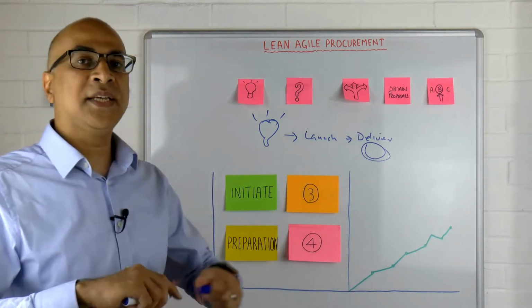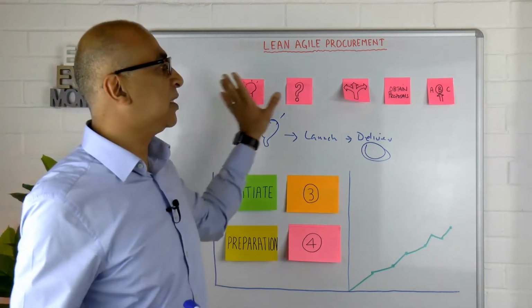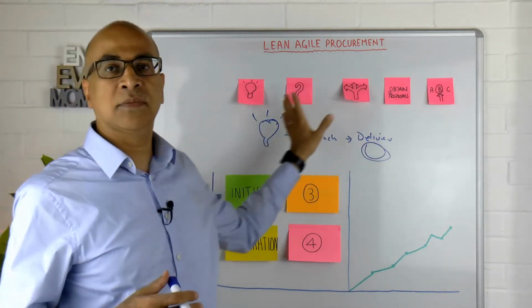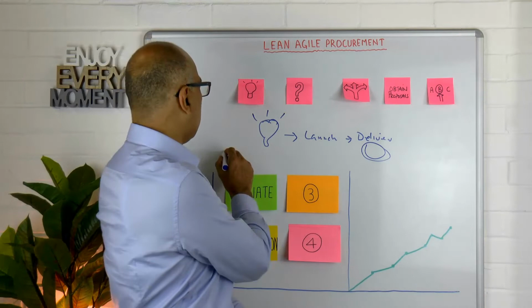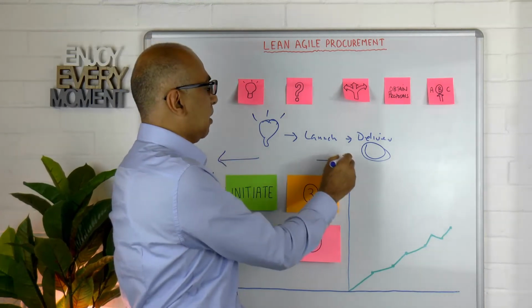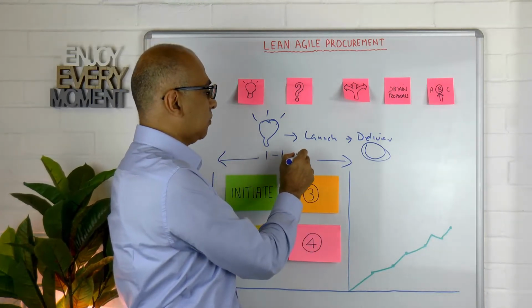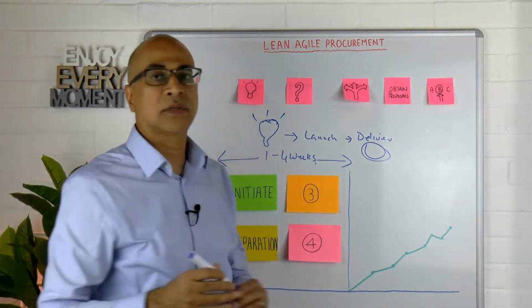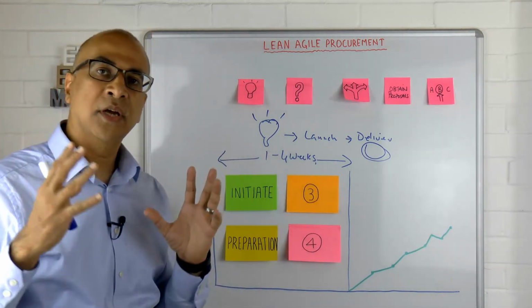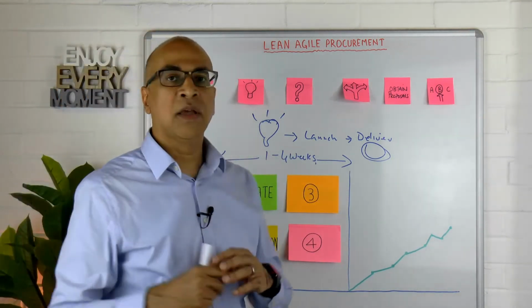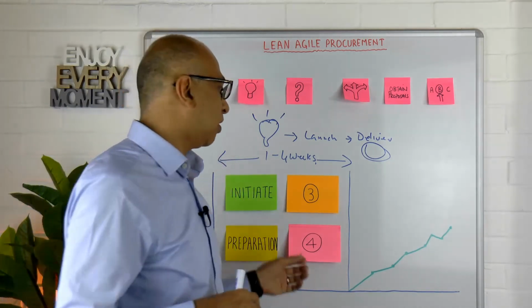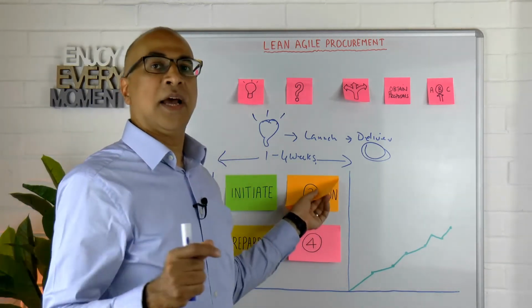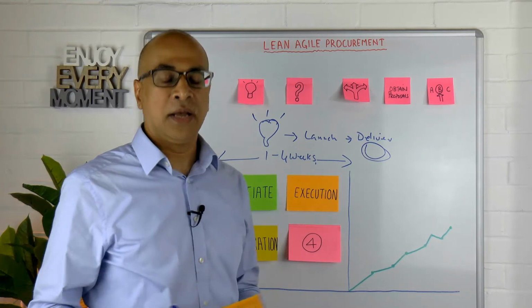Now remember, this timeline is like I was saying, whereas this typically takes 6 months plus, over here we're looking to bring all of these 4 stages in between 1 to 4 weeks, right? So it's a massively compressed timeline, which aligns us with the philosophy of Agile, where we're trying to get things quickly and get that outcome.